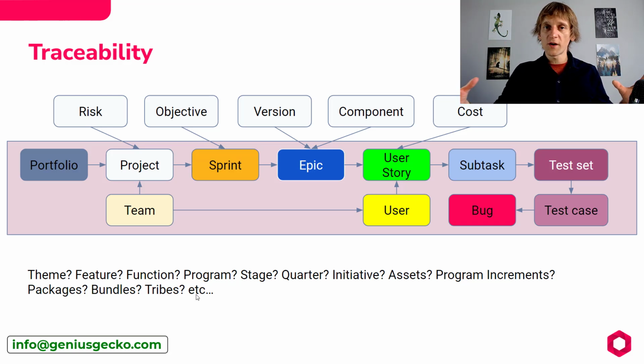And because BigPicture is working on Jira data, it's almost exactly the same. Doesn't matter where you put it. And this is a big thing. So when someone is working on this user story or someone is working on a subtask and they change the status and they say, this task is done, the project manager over here sees this information immediately and then knows, okay, this is done. Let's focus on the next one, right? If someone reports some hours on the task, it immediately moves the progress forward. And here the project manager sees that from 20%, it jumped to 50%. Awesome, job well done. I'm on track.